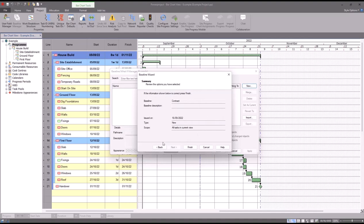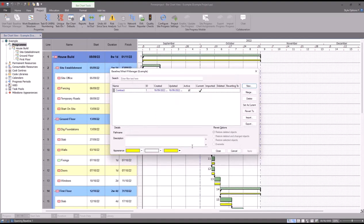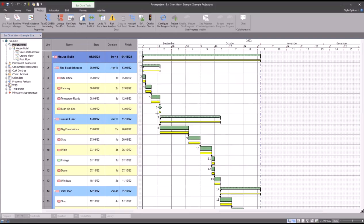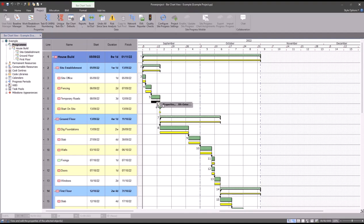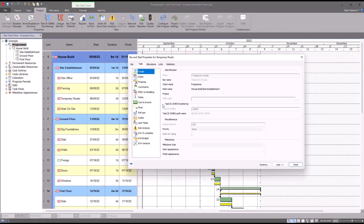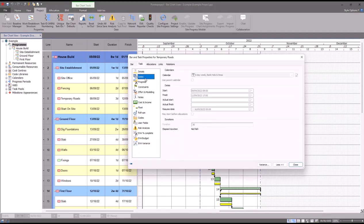If I now click next, I just get like a little confirmation screen of what's going to happen. Click finish, it'll create my baseline for me. If I now close my baseline manager, we can see I've got all these little yellow tasks underneath my live activities. I can click on them, I can't move them around, I can't do anything with them. I can't adjust the dates, the durations, and even if I go into the properties for this activity, you can see that everything's grayed out. I can't modify any of this information.